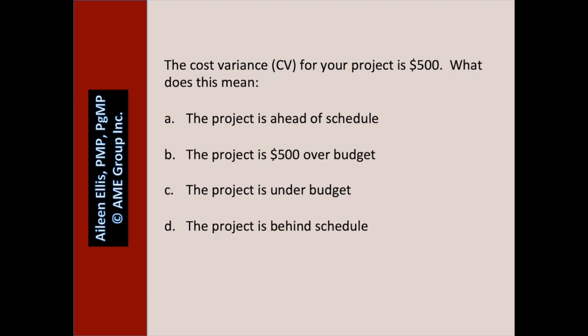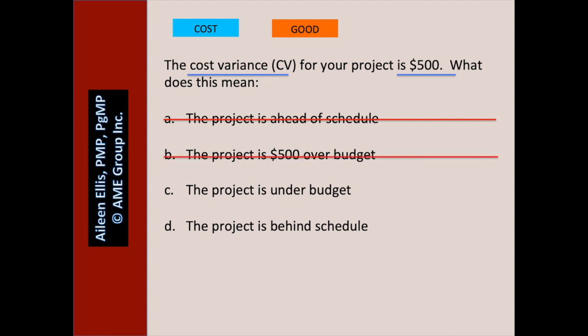The cost variance for your project is $500. What does this mean? Pause the video and answer the question. First I ask: is it about cost or schedule? It's about cost. $500 — that's a positive number, which is good. A: the project is ahead of schedule — we have no idea because we don't know the schedule variance. B: the project is $500 over budget — no, our cost variance is a positive number, that's a good thing. C: the project is under budget — that's the true answer. D: the project is behind schedule — we have no idea because we don't know the schedule variance.